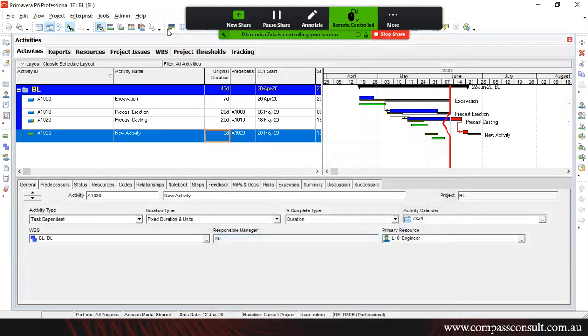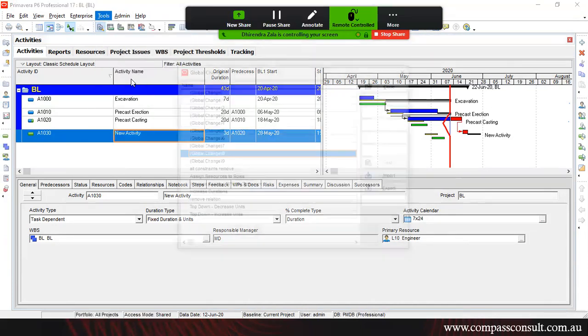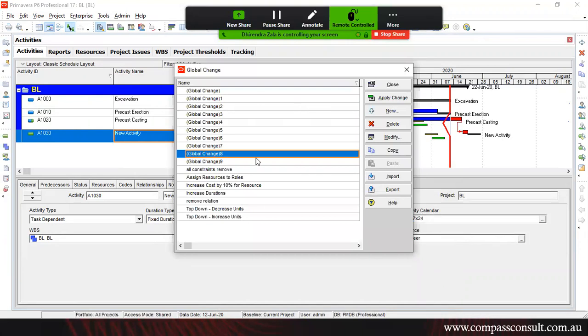So this type of corrective action you can perform while doing this execution. So think, if you have a thousand activities here and you have to change the calendar of 1,000 activities simultaneously on a single click, there is only one option for that. So it will reduce rework, and it will help you get out with some corrective action.